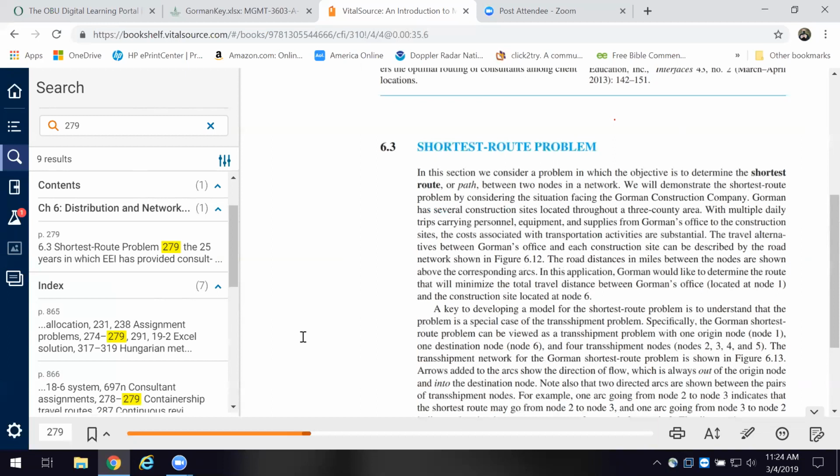Do I have slack resources that I can employ? Now, people that work in construction still use a thing called a Gantt chart, G-A-N-T-T. The Gantt chart is basically a matrix where it has a task, completion, start and end, and then it will have the tasks in a row. And so you'll see these intersections, if you will: task A, when I start it, when I end it. They use those charts and take the model and compare it with what they're actually doing to see, is there slack time?